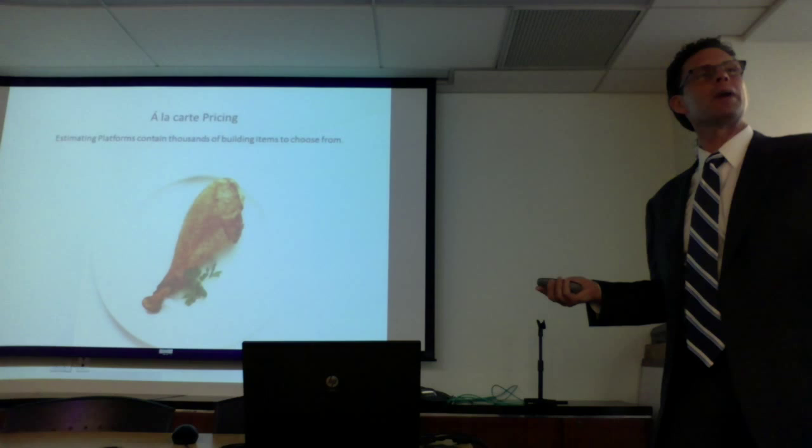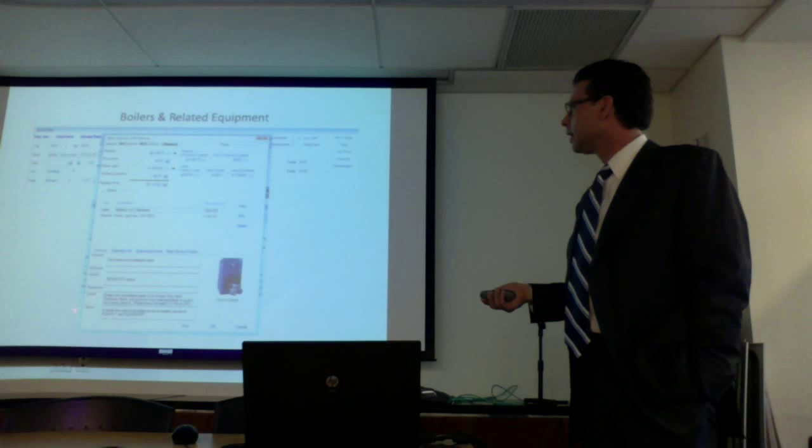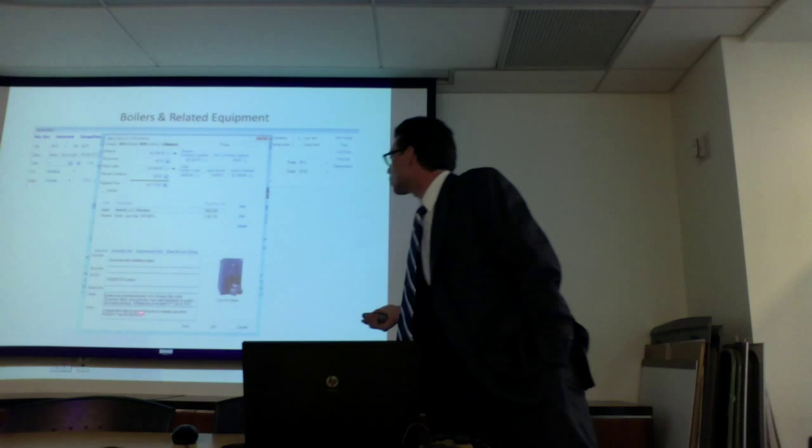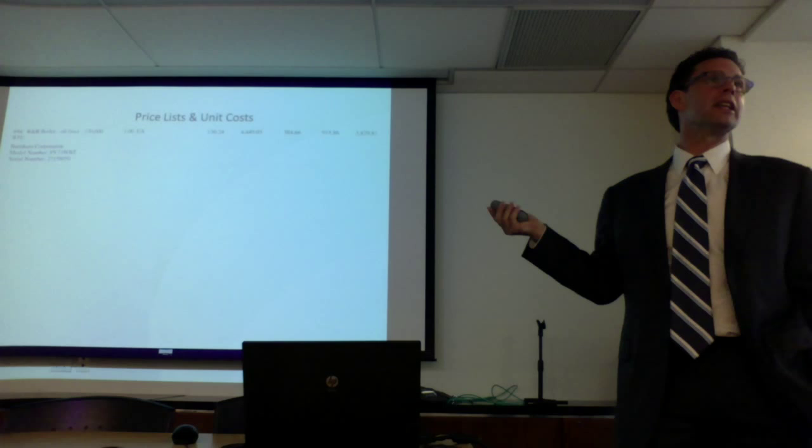So going back to the boilers, when I look at the boiler and I say what's included, it says gas boiler and installation labor. There's a note, this is Xactimate, that says if check valve and/or circulating pump is needed, use, and they tell you what to use, PLM CHV, PLM PUMP, which you would plug in here and it would give you those line items.